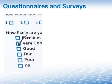Questionnaires and surveys are most appropriate when you want to collect requirements quickly and from a large number of stakeholders. They work well when stakeholders are distributed throughout the world or if you need data that you can use for statistical analysis.